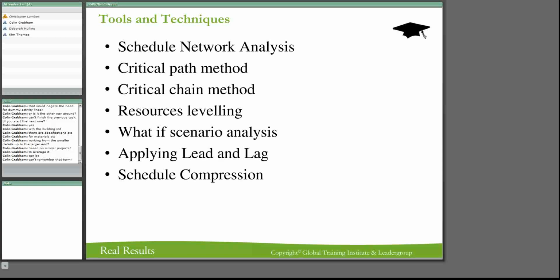The critical path method calculates the theoretical early start and finish dates, and the late start and finish dates of all activities without regard for any resource limitations. All right? Then you're going to calculate and estimate, and you're going to mitigate some things by implementing some slack in there. You put some slack in there because you know that something could actually happen. Rain could happen, an excessive rain. Someone could be late on one of the activities.